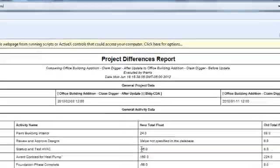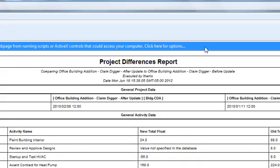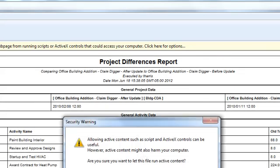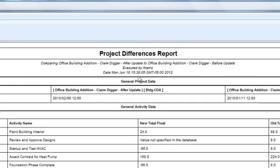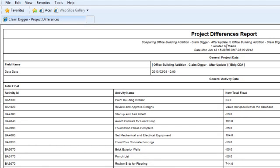This is a sample of the report that might be generated from ClaimDigger. You can see it's called Project Differences Report. It shows what two projects were being compared, the user who initiated it, and the date and the time.